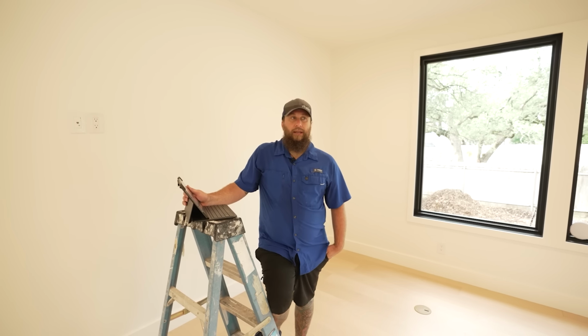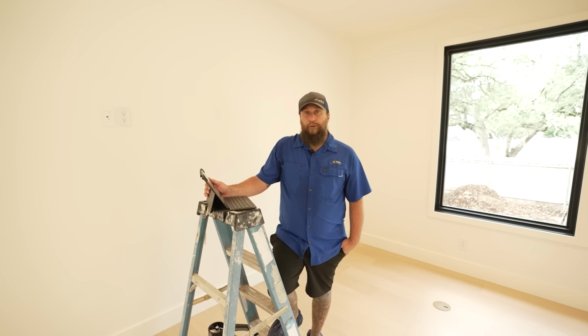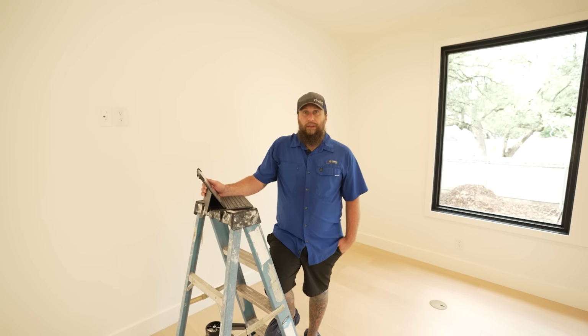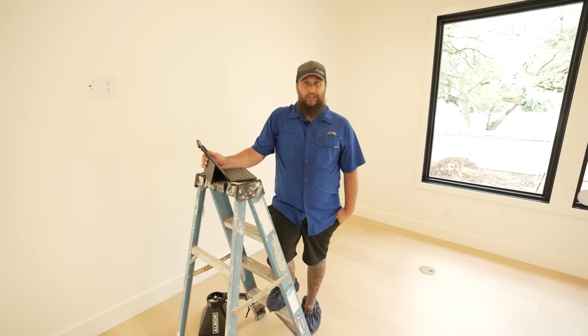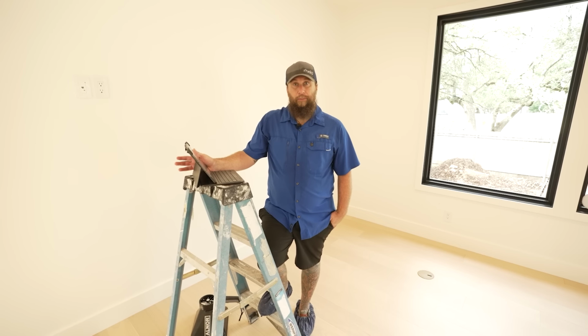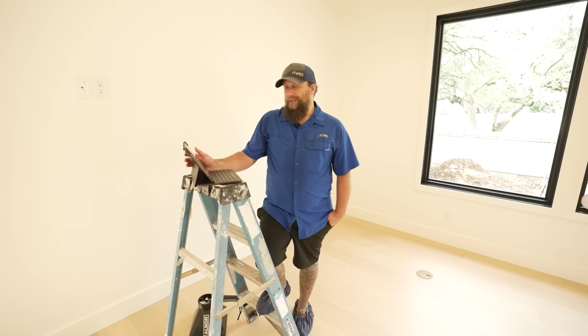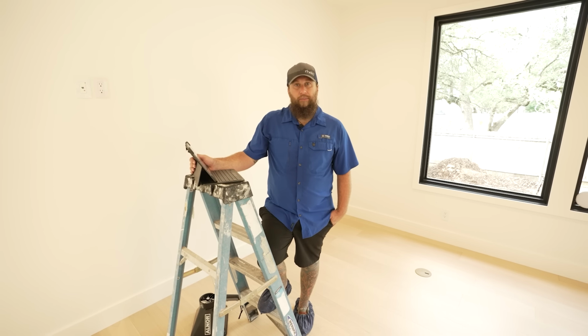happening. Maybe there was a hard bend and maybe a fitting wasn't utilized, or maybe something was run a little bit too loose and there's a lot of resistance within that duct. Paying attention to the measurements while you're going through the process helps you determine if there's an issue. If you ever measure a diffuser and there's a 0, that tells me that someone either disconnected a duct or there wasn't a good connection in the first place, and you want to make sure that that's being addressed before you move forward throughout the rest of the home. Otherwise, everything you've done to that point is going to be inaccurate. So although you're not going to be dialed into exactly what's going on through this portion of the process, you do want to pay attention to the measurements that you're getting.